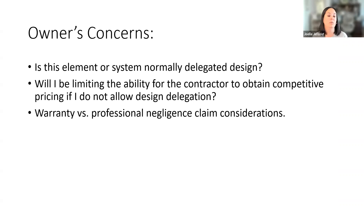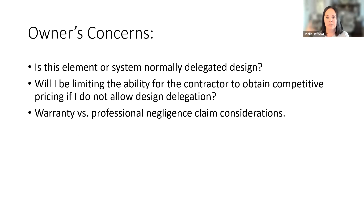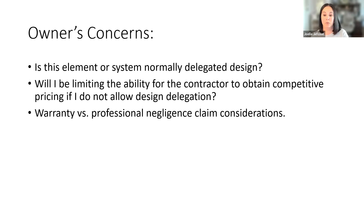An owner also needs to consider the difference between warranty claims and professional negligence claims that can arise when something is delegated. If there's a claim against a design professional, it's couched in professional liability as a professional negligence claim. But if a delegated design element has an issue, the owner needs to consider whether it's a warranty item — invoking a one-year warranty claim against the contractor — or whether to structure the claim as a professional negligence claim. There are time limitations around that, and owners should consider requiring their general contractor to carry professional liability insurance to cover delegated design items.